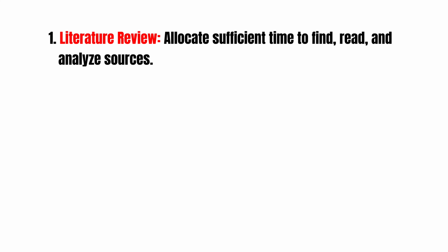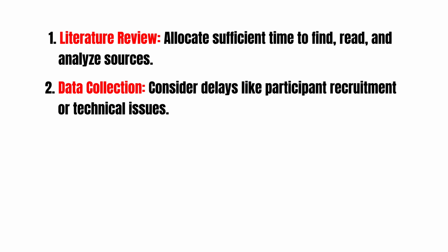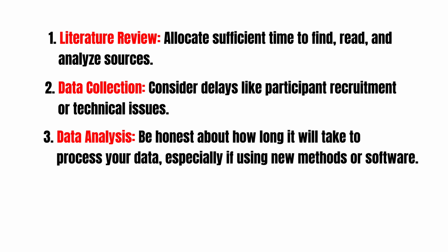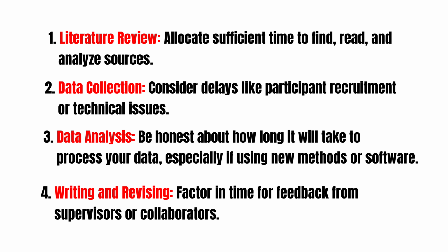Here are some tips for a realistic time frame. For a literature review, allocate sufficient time to find, read, and analyze resources. For data collection, consider delays like participant recruitment or technical issues. In data analysis, be honest about how long it will take to process your data, especially if you're using new methods or software. While writing and revising, factor in time for feedback from supervisors or collaborators.